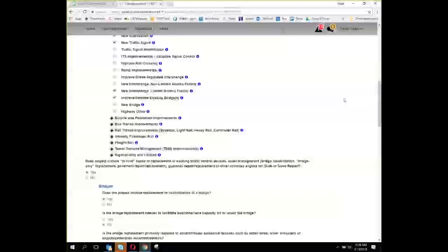It was related to the limit on the pre-screening of the applications. Let me answer that along with a couple other points about the pre-apps, mostly to reiterate some of what Chad has already brought up. There is no limit to the number of pre-applications that can be created. You can't create new applications after June 1st. There is a limit to the number that you can request for pre-screening, and that limit is based on your application limit, a file posted online on the Resources tab.